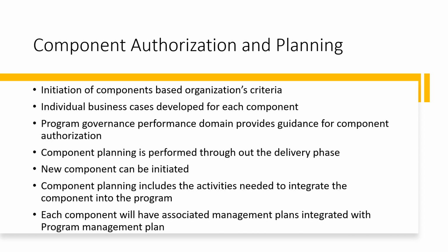The first sub-phase of the program delivery phase is component authorization and planning. What activities happen while authorizing the component and planning it? Initiation of the components is based on the organization's criteria. How many components you need, how many sub-components, or how many projects you need to initiate based on your strategic goals, you define here. Individual business cases are also developed for each component. So every project or every sub-program will have its own business case.